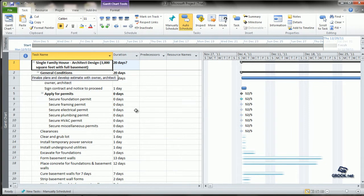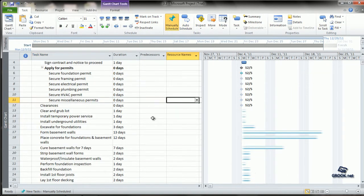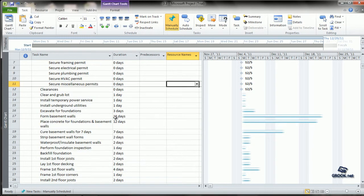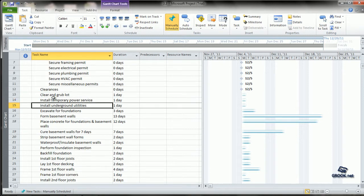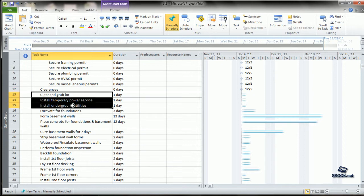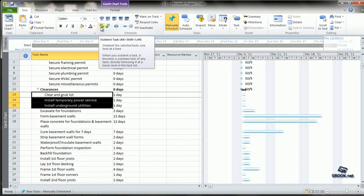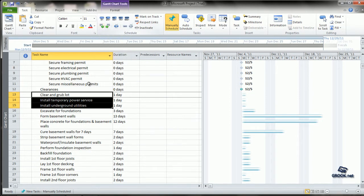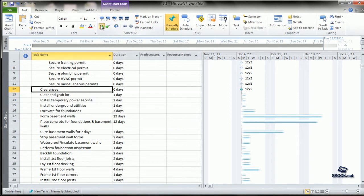Now we have seen how to add phases to already created tasks. The same way, we can also add tasks to phases which are created. That is, let us say that we already want clearances as the heading and these two or three things to be under it. So if the phase is already created, we can add tasks by indenting it or we can outdent the summary task.